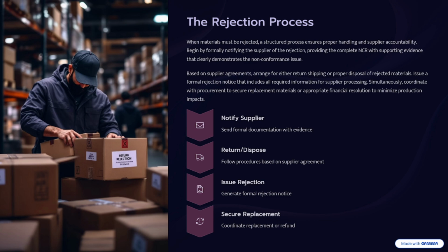Every site has store management, actually this comes under store management. Store management have their requisition or form, and I know that there is a rejection form from them. You can ask them to generate a rejection form or return process form so that you will attach it to your NCR. That has to be generated before returning. After that, the material has to be returned from your storage or from your project to the supplier in order to start refunding or replacement. Mostly this will go under replacement. They will replace it with the approved material.